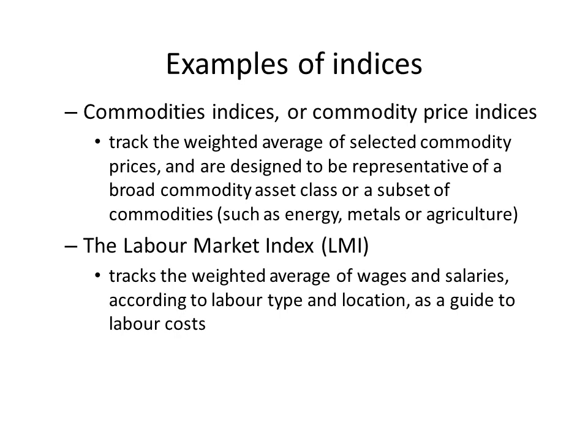There are indices on commodity prices, there are indices that measure inflation, and there are labour market indexes which track the weighted average of wages or salaries, and often these are used as a basis in contract price adjustment formula, or as commonly known, CPA. So if there's a mechanism in the contract to adjust the price, it's often based on the changing cost of labour and/or goods at certain points in the contract.